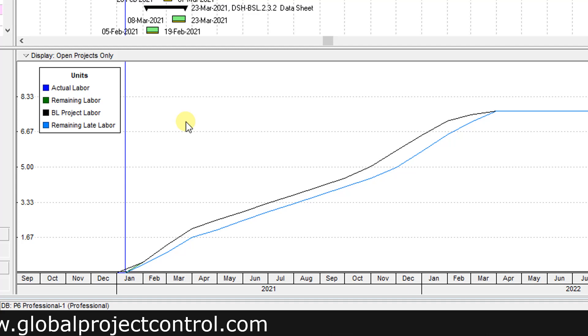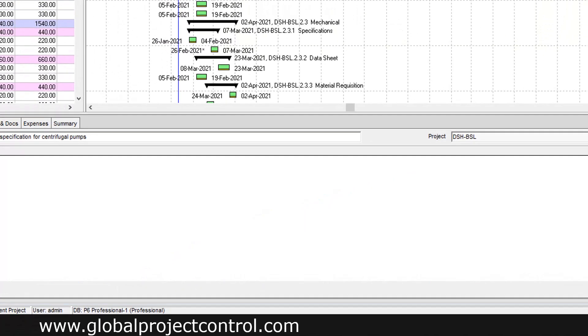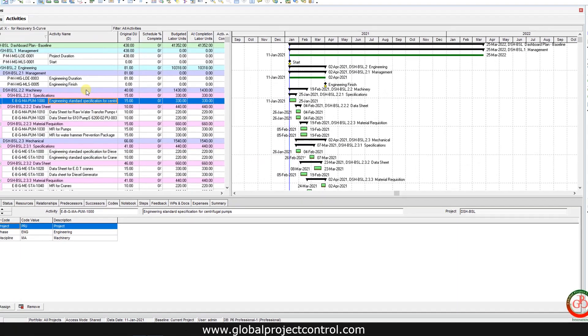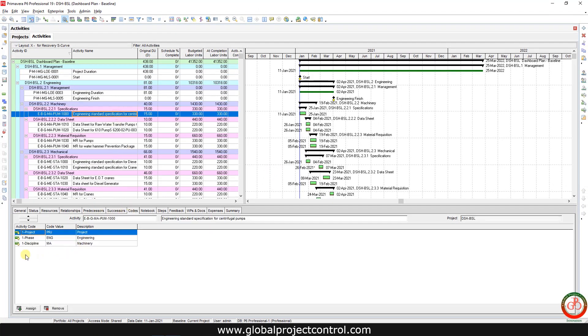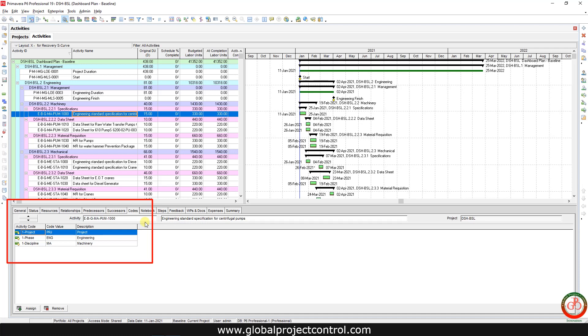So how we can create this S-curve by Excel? If you go to the activity detail on the code tab you can find the activity code for this project, because we want to create slicers for this curve so the activity code is very important for this item.